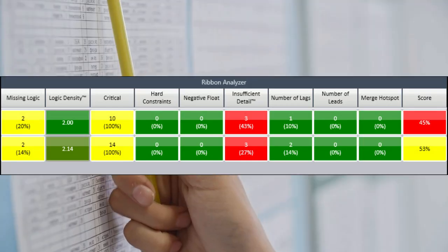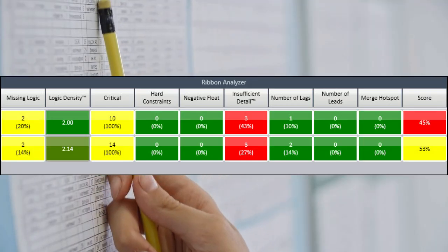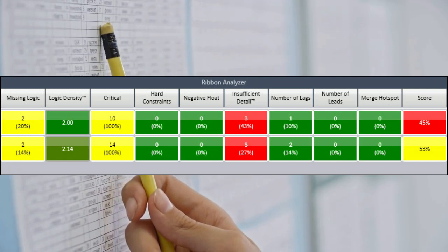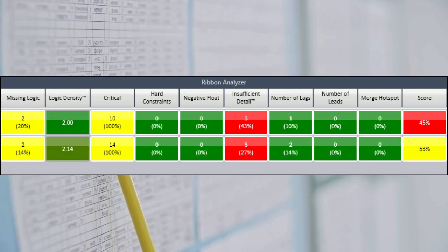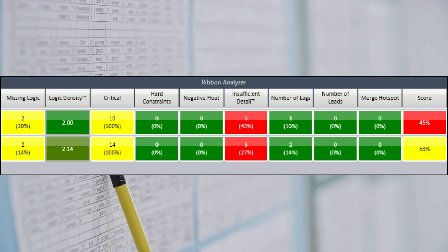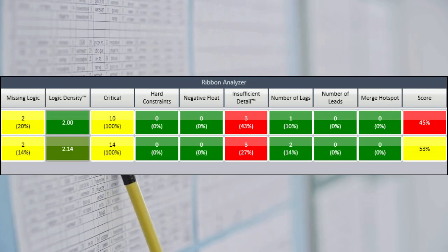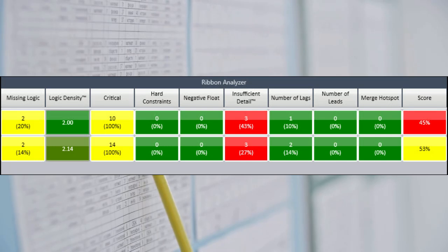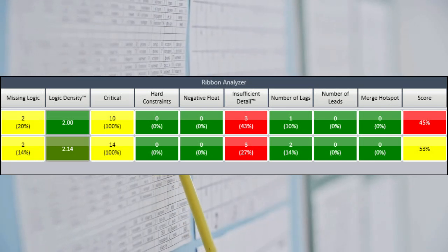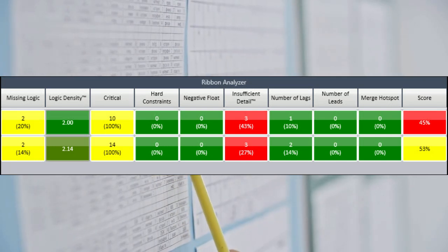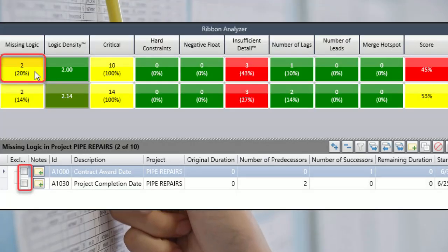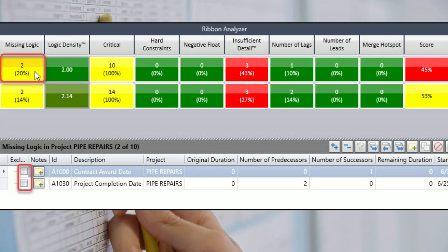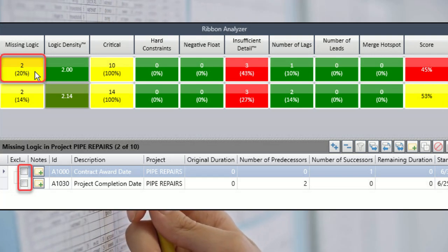We want to perform a risk analysis but must perform diagnostic analyses to confirm quality schedules before continuing with risk modeling. Proceed and click S2 Diagnostics, confirm the schedule quality is the active metric group, and click Fuse to analyze the quality of the schedules. The output of the schedule quality metric group analyses for each schedule is in here.